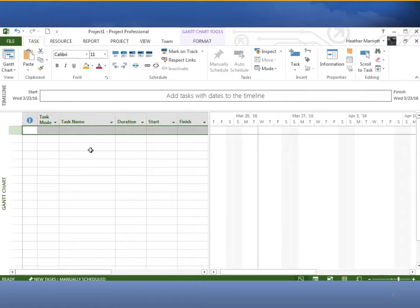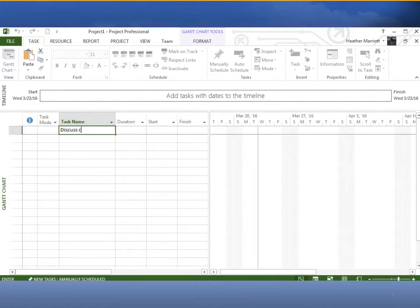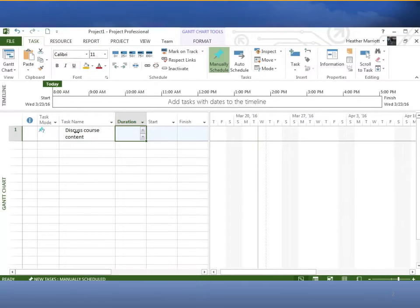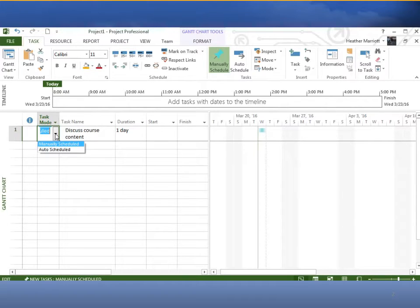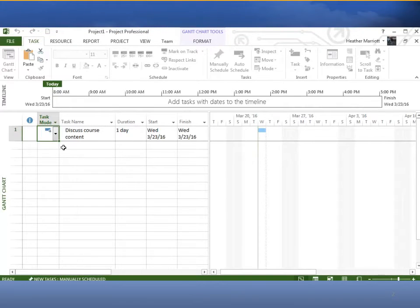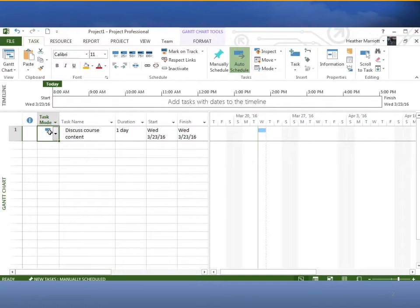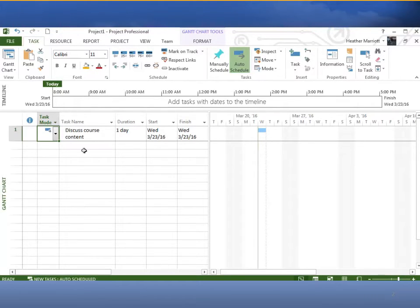We have this very simple task of creating a new course at a university and we were given the four tasks and the durations. The first one was discuss course content, and that was one day. But we were told that instead of having all these tasks manually scheduling where you have to put in the start date and the finish date, we wanted to make everything auto scheduled. We can make sure that is auto scheduled here and make sure that you click on this green bar at the bottom to switch from manually scheduling to auto scheduling.